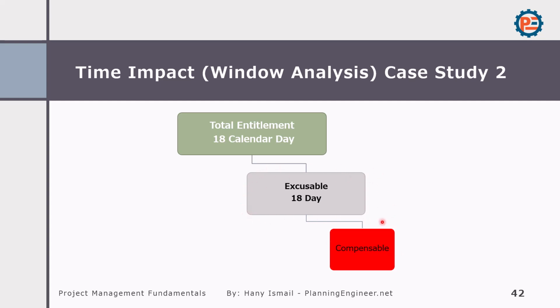There is one argument here that, okay, why do you need additional time? We have some variation order, we give you the cost of the variation order, and why do you need additional cost for this additional time? You already have the additional cost in the variation order. The answer is very simple. You give me additional cost for the additional scope of work. What about my original team and original scope of work extension?